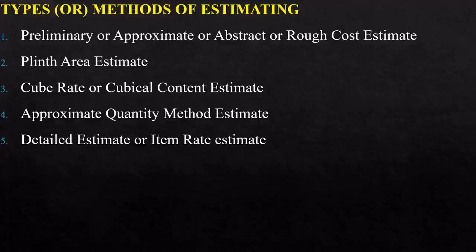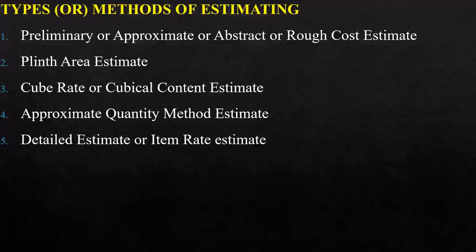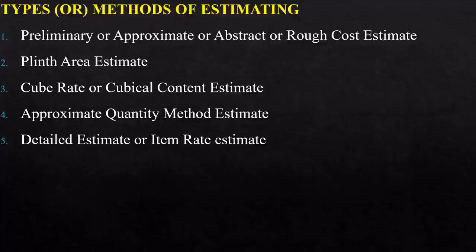The fifth type of estimate is called a detailed estimate or item rate estimate for each item. This detailed estimate is an accurate estimate. It consists of working out the quantities of each item of works — you find each item, then multiply the cost for each item. The dimensions, namely length, breadth, and height of each item, are taken from the drawings, quantities for each item are calculated, and abstracting is done. The detailed estimate has two stages: first, details of measurements and calculation of quantities; second, calculation of cost.